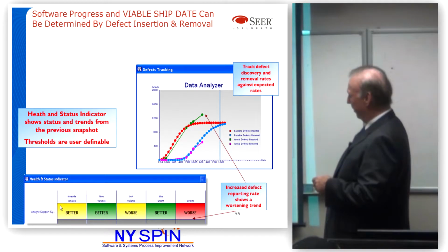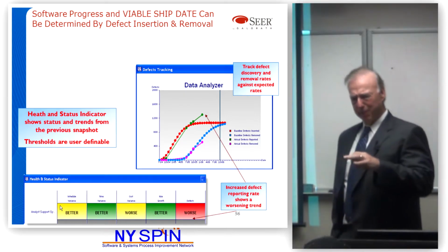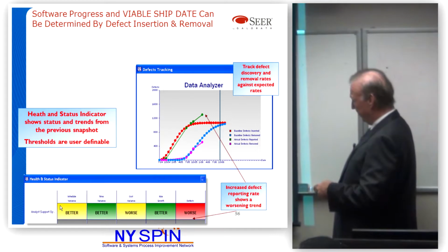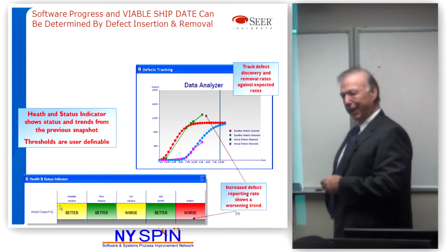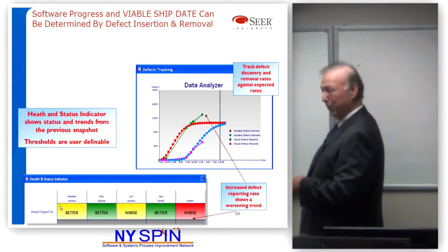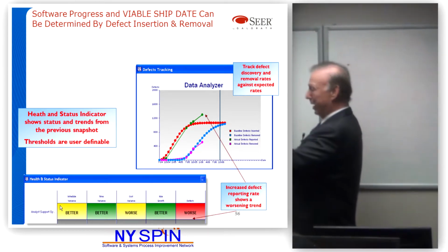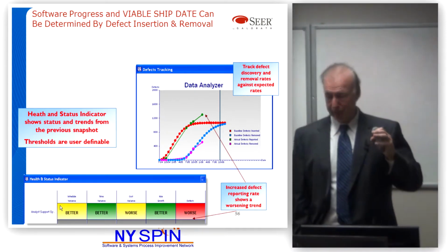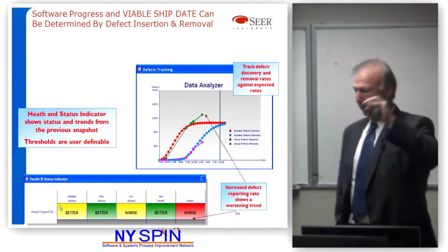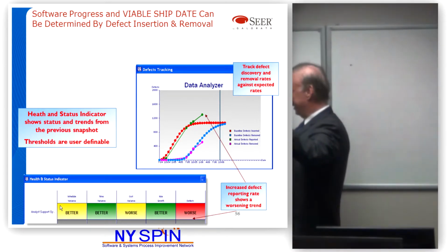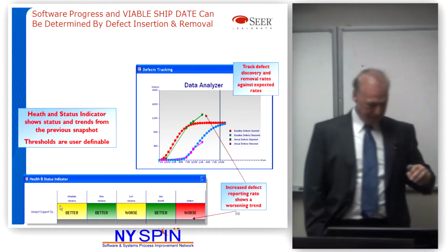So in this example, we found more defects. You can argue if that's good or bad, because maybe finding more means you're finding them earlier, that's good. But we fixed fewer. The purplish line is fewer defects fixed. Hence, this project's in big trouble. We're finding more, we're fixing fewer, this project's in big trouble. It's running, and we're partway through the program, we're not completed, but our metrics could flag projects that are in big trouble early. Without this kind of information, again, I'm preaching to the choir here, hopefully you all are collecting this kind of information, what happens?